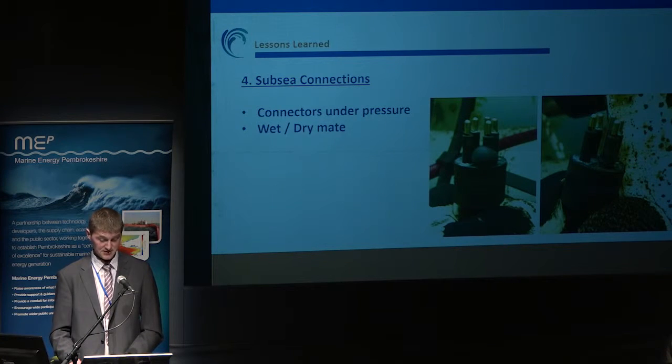This connector was disregarded as being a fault, as it had been checked and secured by electrical engineers. A lot of time and money was spent looking for the problem, and a lot of parts recovered and tested. This is just showing how simple a fault can be, and not all parts supplied can have obvious defects. The lessons learned from this would be to check the obvious and don't assume that all parts supplied are fault-free. This part was fault-free until used on site and at depth.